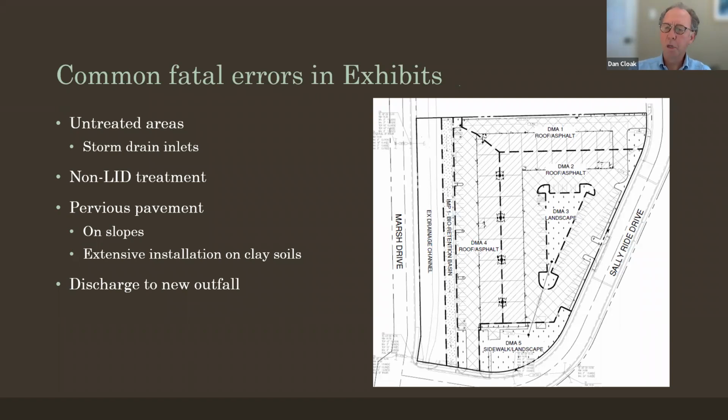I'm just noting here the experience with having pervious pavement on a site to reduce the amount of bioretention that's required, and then realizing that, while it's being proposed as a means to achieve compliance, the applicant is actually not going to be able to follow through with what they're proposing.